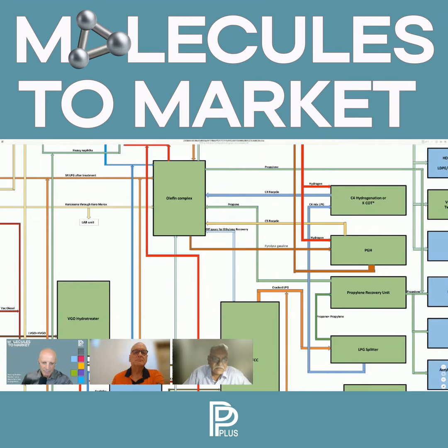For instance, in a mega complex, the Olefin complex, the FCC and CDU, they all control the project completion as such. So we will do this on the EPCM route. But, let's say, these may require between 42 to 48 months to implement. But there may be smaller units. For instance, there could be a polymer unit, there could be a hydrogen plant, there are much smaller units, where possibly the cycle time to implement may not be very large. It could be maybe 24 months, 30 months, something like that. So those are the units where we can also go for EPC mode of implementation.